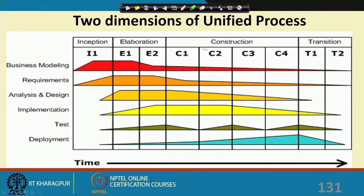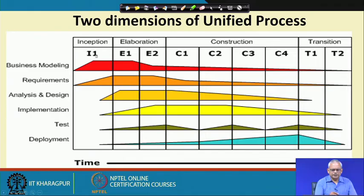We looked at the RAD model and also the Unified Process. The Unified Process is extensively used for object-oriented software development. It is an incremental model in the sense that much of the requirement is identified upfront, but it also has features of evolutionary development because features continue to be discovered as development proceeds. The development occurs over four phases, and each phase can consist of several iterations. The life cycle activities overlap across different phases but peak during certain phases.